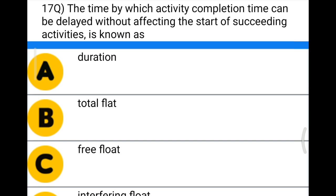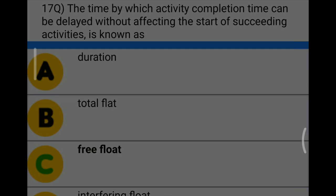Next question: the time by which an activity's completion time can be delayed without affecting the start of the succeeding activity is known as — Option A: duration, Option B: total float, Option C: free float, Option D: interfering float. The correct answer is Option C, free float.